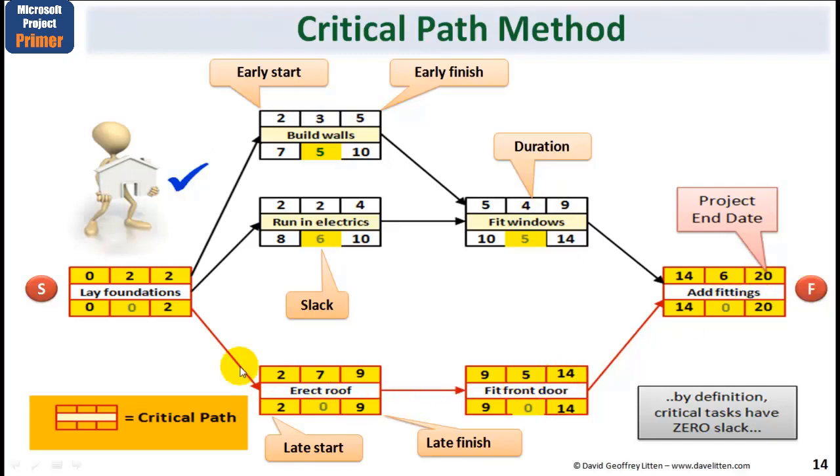Because it allows the project manager to ensure that the most experienced people are put on critical tasks. It allows the project manager to focus and review and monitor critical tasks more regularly, and the reverse for non-critical tasks. We could put people who are still learning their trade, knowing if they took a little longer, it wouldn't cause the end date of the project to be delayed.